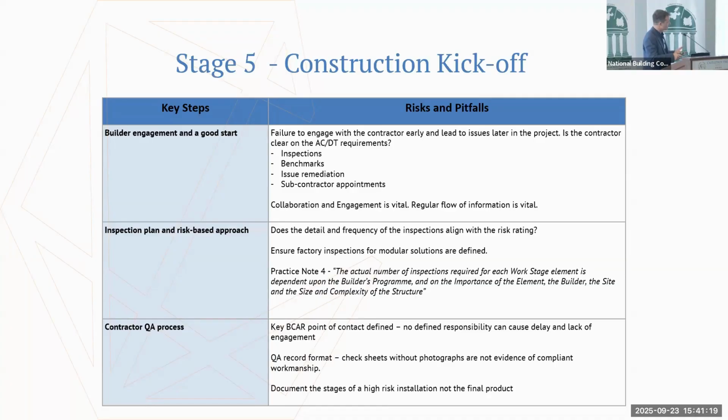They're tick boxes. I think in the early days of Catalyst, we did accept checklists, going back to 2015 and 16. We were hounding one particular contractor for a number of months looking for overdue checklists, and he turned around and said, look, I'm going to set some time aside this weekend, I'm going to do them. This is 4 or 5 months after the fact. So basically his job was to tick boxes and hand them over. So we don't accept those now. Checklists are fine as long as they're accompanied with photographs and actual evidence. So setting that out early is good.